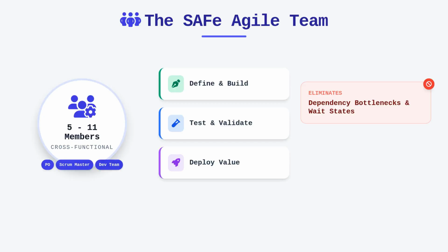If a team relies on external departments to complete basic tasks like testing or infrastructure provisioning, they are effectively tethered to the velocity of those outside entities. A truly cross-functional team internalizes these capabilities, thereby reducing the wait states that inhibit flow. We achieve this by ensuring that the team composition reflects the end-to-end nature of the value being created rather than just functional expertise. When members understand that their collective outcome is more important than their individual task completion, the team begins to operate as a single engine.